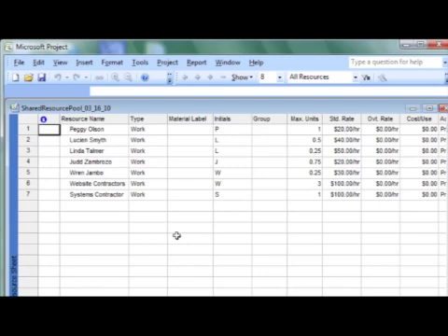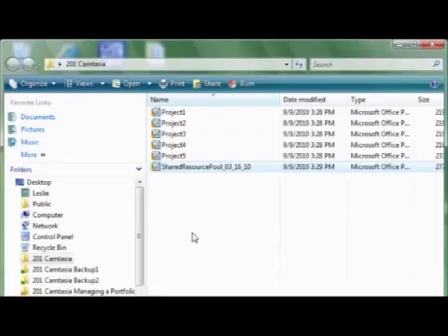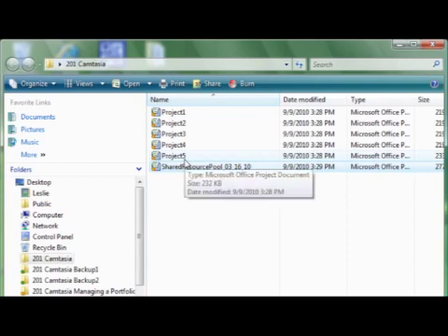So every 7 days, you should get the status reports from the team members for their project work and update the consolidation. We want to get each team member's update on the hours of work completed and the hours of work remaining. So first, we open the directory of projects, as you see here, and then we open each individual project file that we have a status report for. So we enter the status reports for the week as well as any changes in project priority.